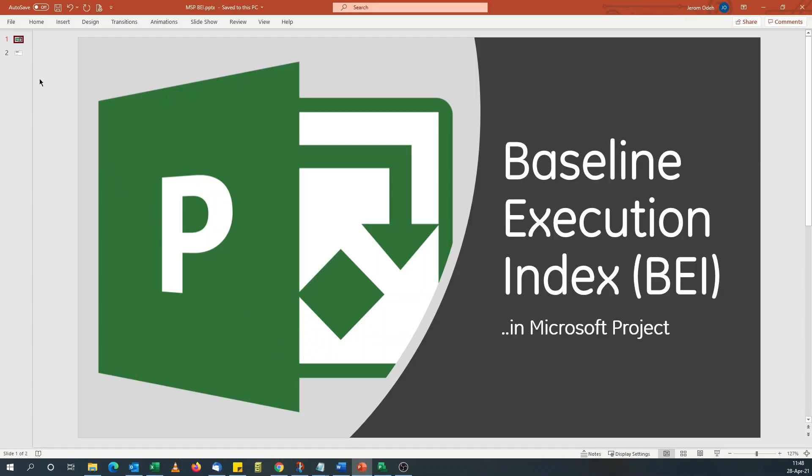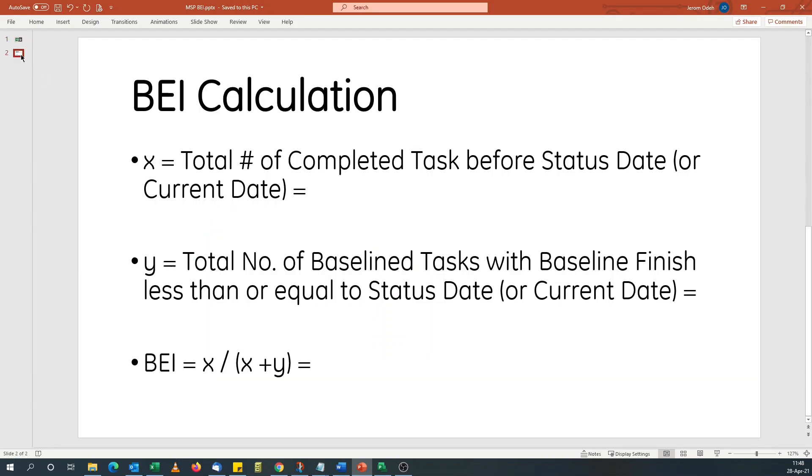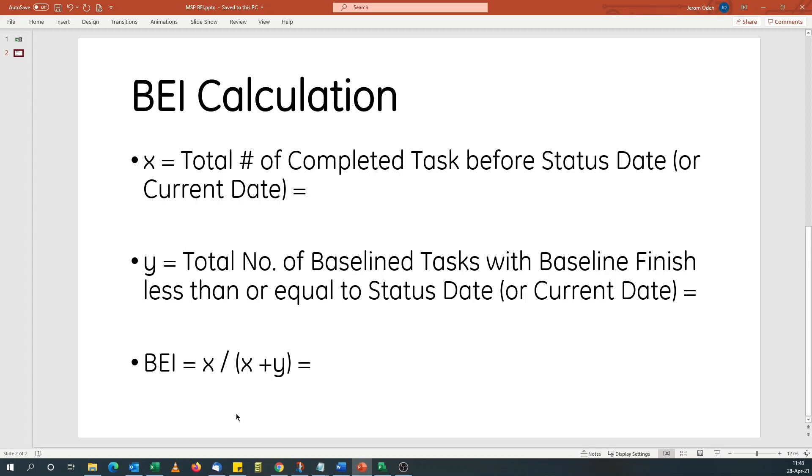That will be similar to this. The summary of that would be X, the total number of completed tasks before status date, which is what I'm going to use in this tutorial, or current date if that's your preference. And the BEI will be X divided by X plus Y.